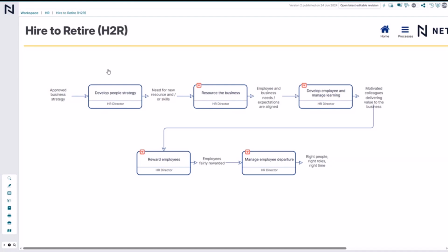but one of the powerful things about UPN is the fact that we highly recommend this concept of every activity having an input and an output, because often, as I was just outlining in the examples that I've had many times in workshops, it's when you are discussing the outputs with the stakeholders and the subject matter experts that you flag up and identify and discuss the problems that happen in handovers.